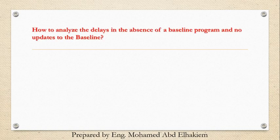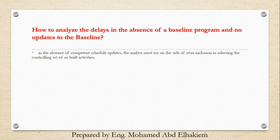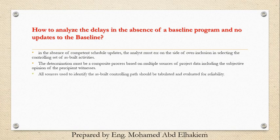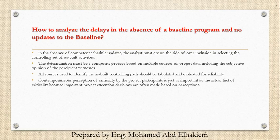How to analyze the delays in the absence of a baseline program and no updates to the baseline? In the absence of competent schedule updates, the analyst must err on the side of over-inclusion in selecting the controlling set of as-built activities. The determination must be a composite process based on multiple sources of project data including the subjective opinion of the percipient witnesses. All sources used to identify the as-built controlling path should be tabulated and evaluated for reliability. Contemporaneous perception of criticality by the project participants is just as important as the actual fact of criticality, because important project execution decisions are often made based on perceptions.